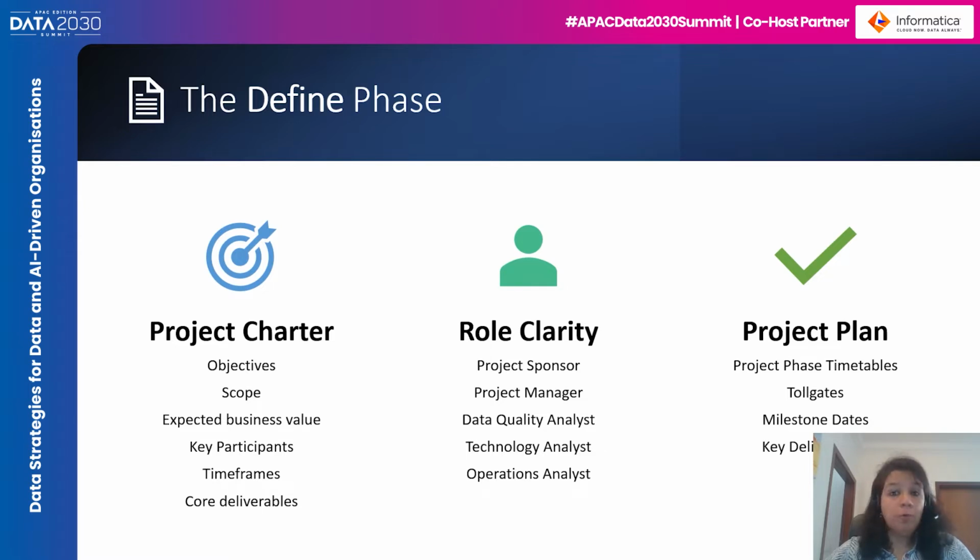Broadly, there are two approaches for defining the overall scope of the project. One approach of establishing data quality project scope can be by selecting data critical to the targeted business process. In this approach, we focus on understanding the quality of that data supporting this critical process, and establishing ongoing monitoring likewise in support of the given process. Any resulting data quality issues are then investigated via root cause analysis, and